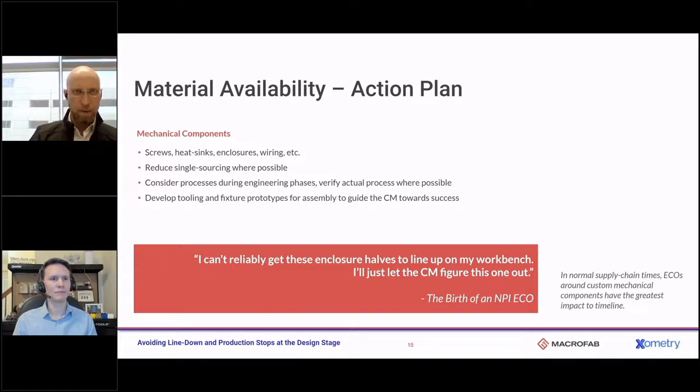You say, hey, it's a screw, right? Just buy it from this one place. Well, can I buy it from five other places? Because that one, their warehouse may be iced in right when I need them to ship if it's in the middle of the winter, right? Or there could be a trucking strike or something that just prevents us being able to buy from that vendor.